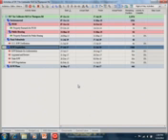So I've created a filter that says if activity owned by is equal to right-of-way, and then I've assigned that filter to this activity view that I've called right-of-way activities. And as Samir said before, once I create this view one time, I can use it on any project that I have open. I could open all the projects I'm working on, so 3 or 5 or 10 different projects at once, and put this filter on, or look at this activity view and see only right-of-way activities.